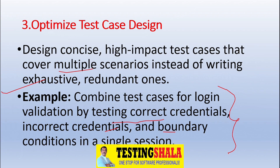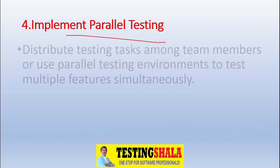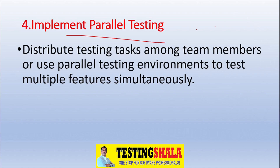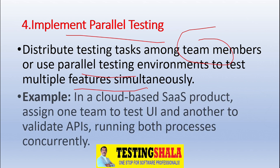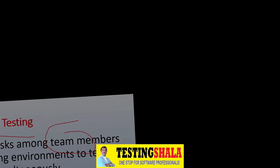The fourth step is parallel testing, which is also very crucial. We should distribute testing tasks among team members or use parallel testing environments to test multiple features simultaneously. For example, in a cloud-based product, assign one team member to test the UI and another team to validate the API, running both processes concurrently to deliver the software more quickly.